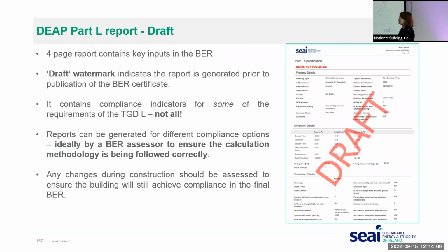And just to note as well, you can generate any number of reports, and it helps designers to look at the best approach for their building to get compliance. But any changes that occur during construction, and there are often many changes for various reasons, should be assessed during the construction phase to ensure that the completed building will still meet compliance.